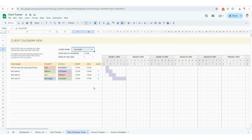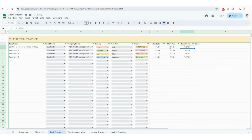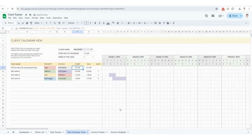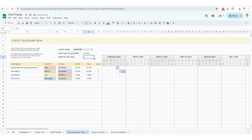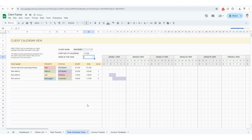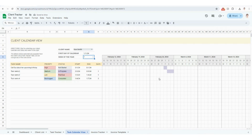A couple of things to note in the Gantt chart are the start and end dates — you want to make sure those are set correctly. For example, if some of these start dates were in March, when you come here it wouldn't show anything because this is pulling from January. To fix that, you change the first date of the calendar to March 1st and click Enter, and then it advances the calendar so those dates show up. You can also advance it by selecting a later week of the year, and that's going to advance the calendar as well.